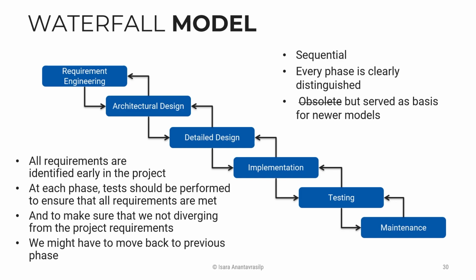Sometimes it works. Another case where Waterfall works best is a project where you know beforehand what you want and you cannot change it. The example that I always use is building software to control a satellite or a ground control program. With these kinds of things, you need to spend a lot of time planning before you actually implement it, because it's going to be costly to change. And you can't just change the software or do a day one patch when the satellite has been launched. You need to make sure that everything is running, that it will run, before you even start launching.